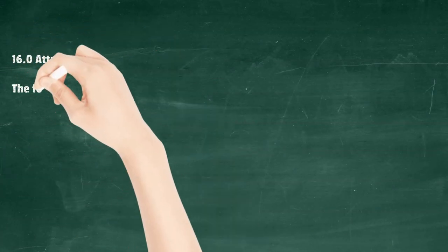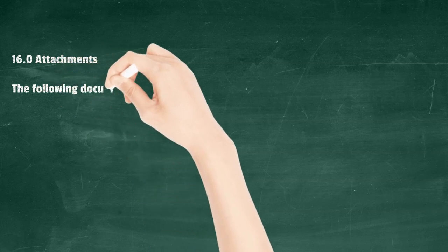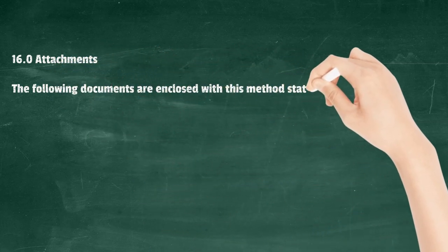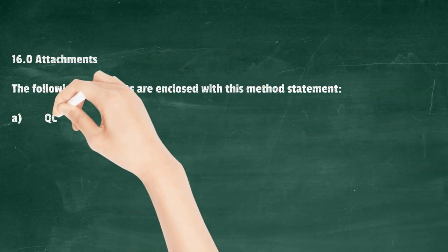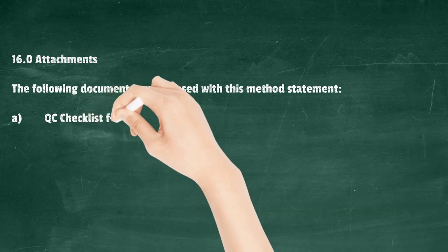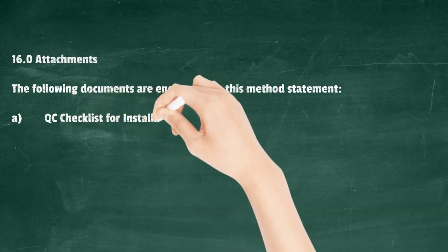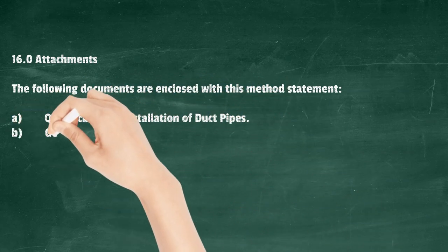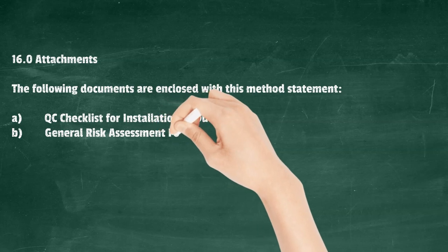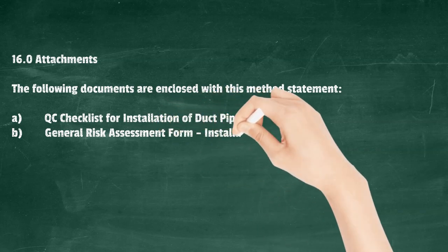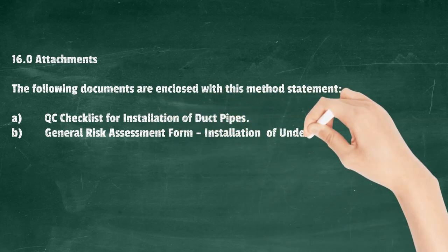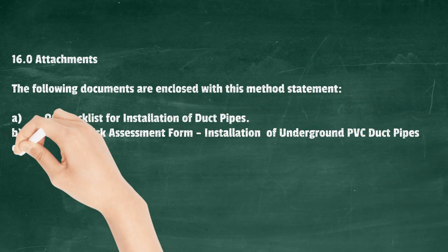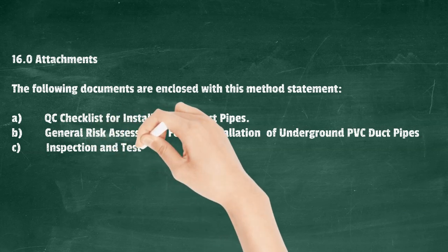Attachments: The following documents are enclosed with this method statement: A) QC checklist for installation of duct pipes; B) General risk assessment form for installation of underground PVC duct pipes; C) Inspection and test plan.